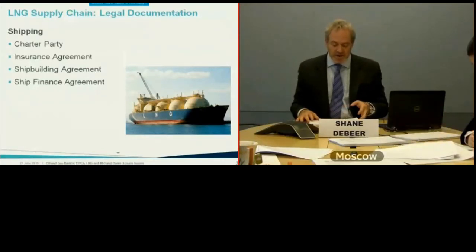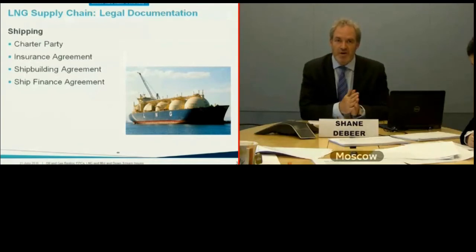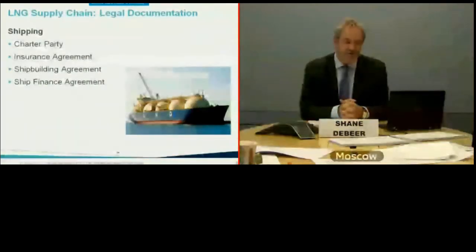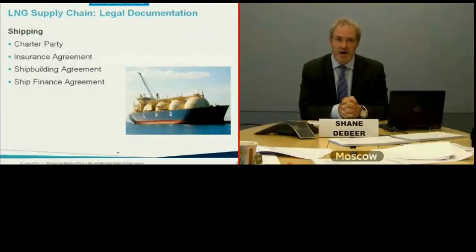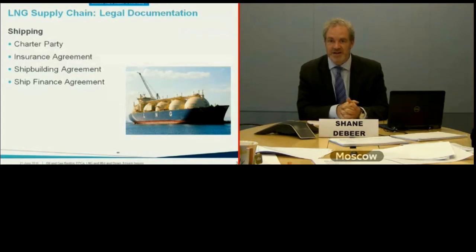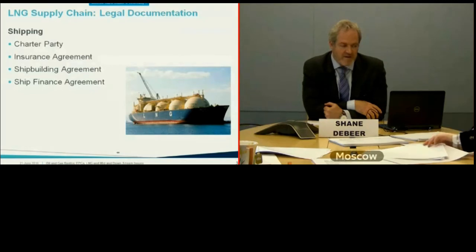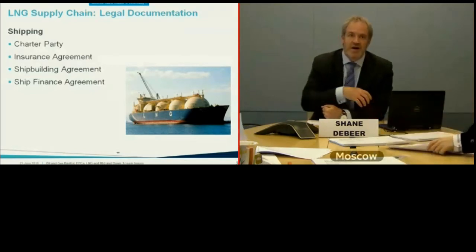For shipping, the key agreement is a charter party. Because there are a limited number of LNG tankers in the world — unlike oil tankers — if you're going to own or control LNG tankers you typically need to have them built, requiring a shipbuilding agreement with a shipyard and a ship finance agreement. There is therefore a heavy dose of admiralty and maritime law involved in LNG projects.